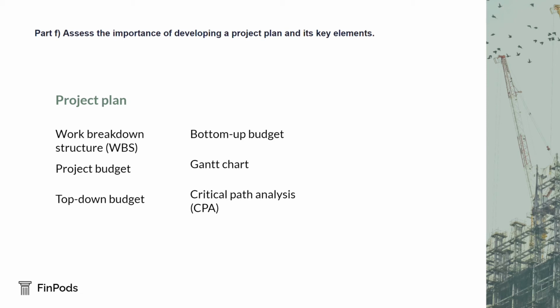CPA aims to ensure the progress of a project, so the project is completed in the minimum amount of time. It pinpoints the tasks on the critical path, which is the longest duration sequence of tasks in the project. A delay to any of these tasks would delay the completion of the project as a whole. The technique can also be used to assist in allocating resources such as labour and equipment.